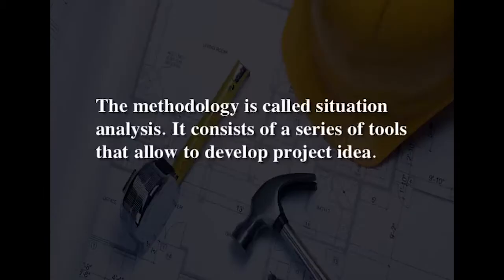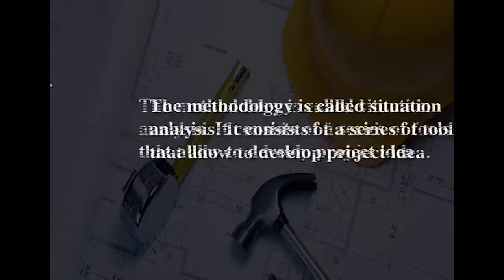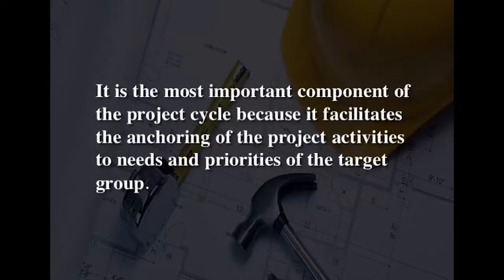Step 1: Project identification. The first step in the design phase of the project management cycle is the identification of the project. The methodology is called situation analysis. It consists of a series of tools that allow developing the project idea. It is the most important component of the project cycle because it facilitates the anchoring of the project activities to the needs and priorities of the target group.